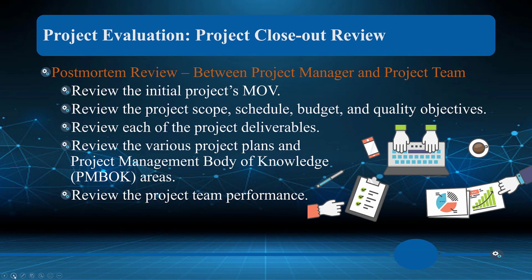So, postmortem review. So, review the initial project's MOV. So in that process of closing and documenting, these are the things we're going to do. Again, we've talked about this. Look at the scope. How did we do? Look at the schedule. How did we do? Look at the budget. How did we do? Look at the quality objectives.